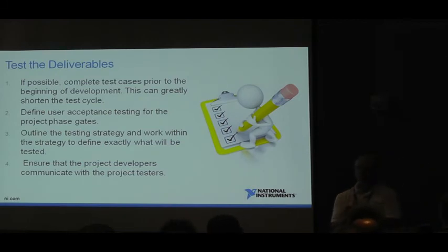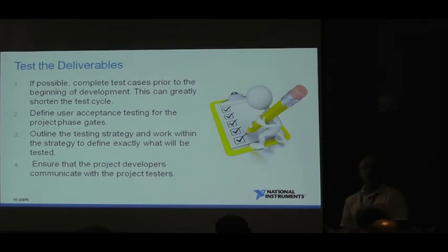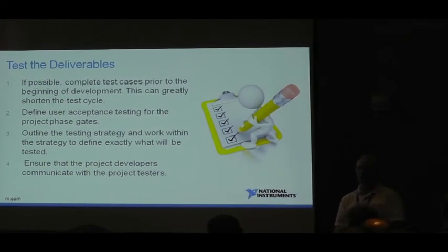So, getting toward the end, we're in the verification phase. At Surtech, we do a lot of verification and validation of safety critical systems. It involves a lot of requirements-based testing. So our strategy is to develop test cases early on in the development lifecycle. So when the software and the hardware engineers are designing their parts of the system, we in parallel are developing our test cases. And so early on, if there are requirements that are incomplete, untestable, vague, we can raise our hand and say, hey, we've got an issue with these requirements. Let's get these fixed early on. And that improves your chances for success.